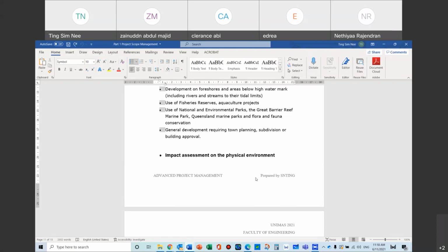Possible is about things that will make it stop that day, right there on the track, and it's nothing to do with money. And viable is when you just don't have the money to do it. It's going to be really expensive if you're going to address all these sorts of issues. And then all the compensation that you need to pay, or the taxes that you need to pay, it's just not worth it. So that is viability studies.